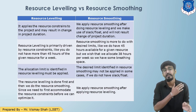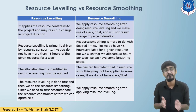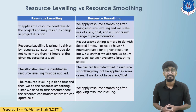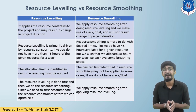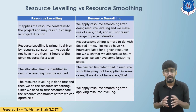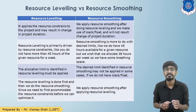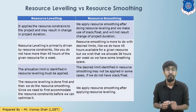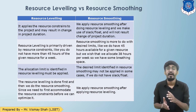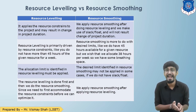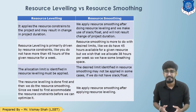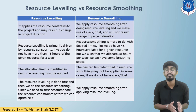The first difference is that in resource leveling the project duration can be changed, but in resource smoothing the time duration cannot be changed. The second point: resource leveling is primarily driven by resource constraints — for example, you don't have more than 45 man-hours per week for a particular labor. Resource smoothing, on the other hand, has more to do with desired limits — for example, you have 45 man-hours per week available but wish to apply only 35 hours to allow some breathing space.